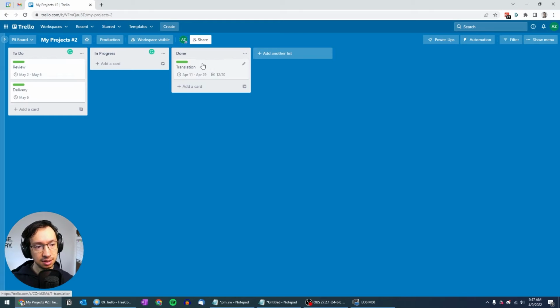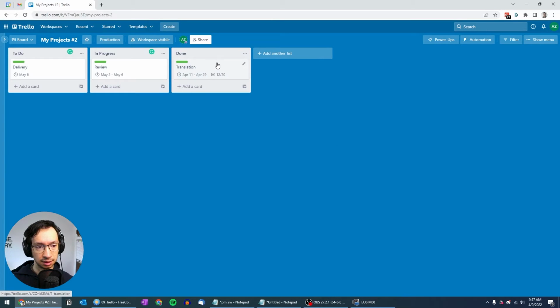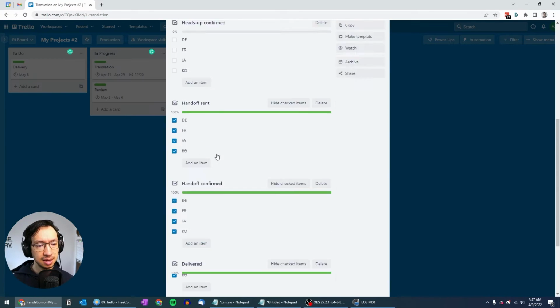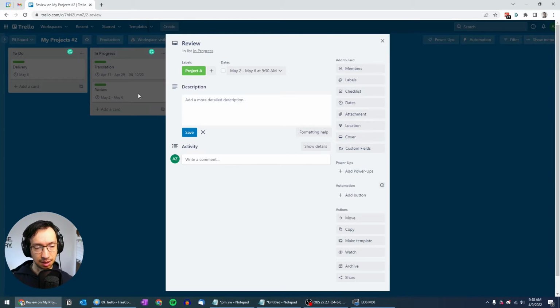And at the same time, let's say once the translation is completed, we can start working on review. But this is where it's a little bit better, because let's say that your translation is done for the Asian languages, but the European languages are not completed yet. At the same time, you can already have review going on for the Asian languages, right? And for the European languages, you could have at least done the heads-ups.